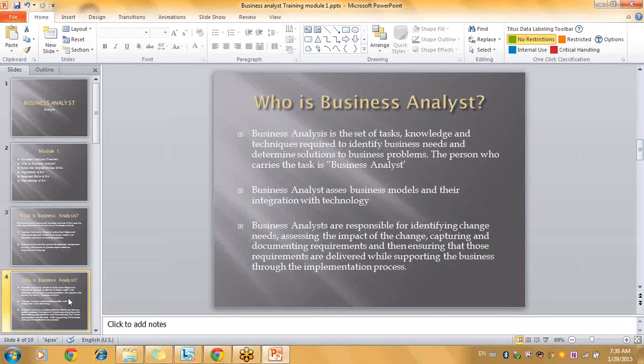And suddenly you say they have asked and you have done the changes. Before you do changes, you should make sure that your application code does not break anywhere. Your current application should be stable enough to handle that change, right? I have made a change, but after making the change, I can't enter only the username. What is the use of that change? That is a loss for IT. You are facing the loss not only in time, but in cost also, right?